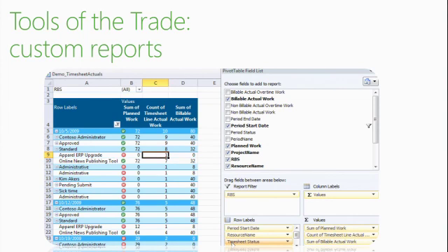I've also seen customers, I didn't put an example there, having one column per week for each of the resources that shows with a graphical indicator the status of the timesheet or the task update. It's green, it was reported, approved, and so on. If it's not, it's red, or if it's in process, it's yellow. So by week, for many weeks, in one snapshot you can see everything that's going on in your system. It's all based on queries and formatted reports, using Excel.